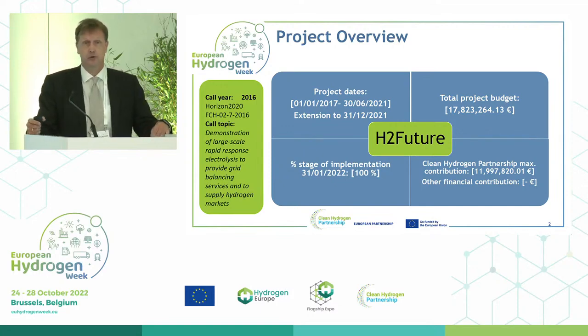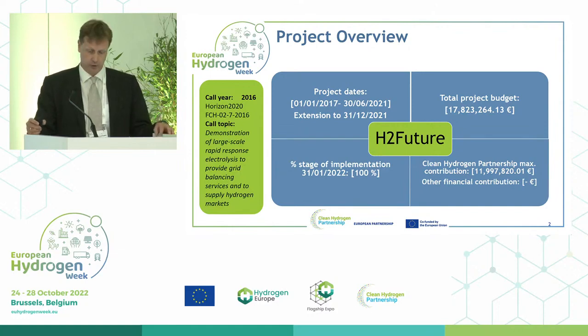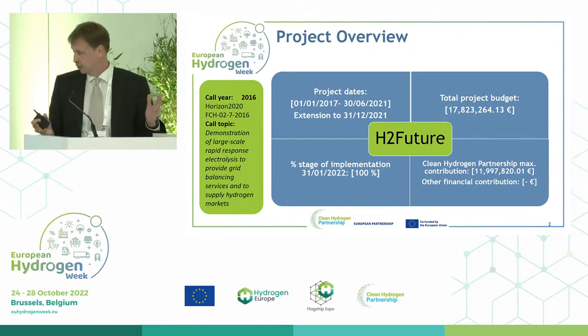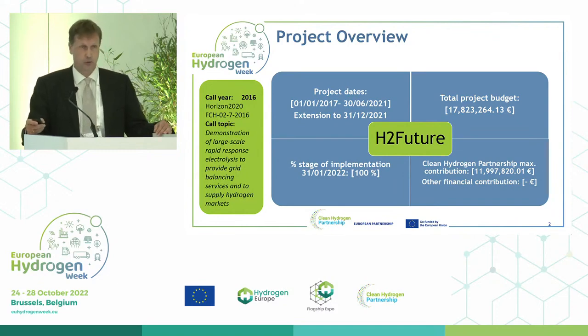So we started in 2017 with the project, and it should have lasted until the end of June, but COVID and other issues forced us to extend it to the end of 2021. Total project budget, thank you Nikos, 18 million euros nearly. The European taxpayer with 70% of funding, nearly 12 million. Stage of implementation, of course, 100%. We are closing the project right now, distributing the last rate. But we will go on, and I will tell you how.